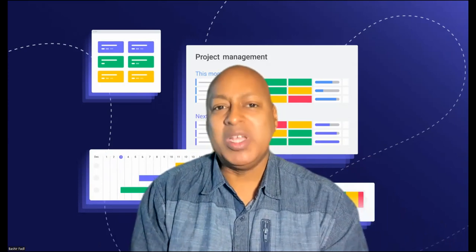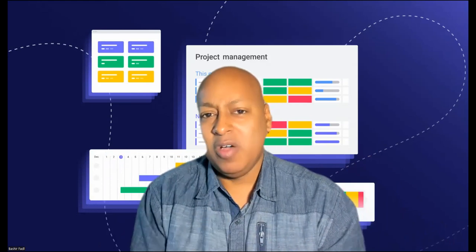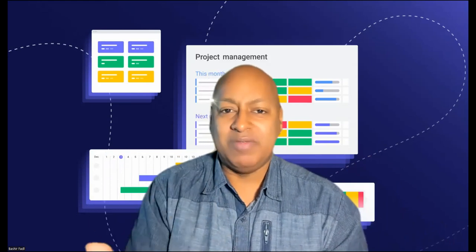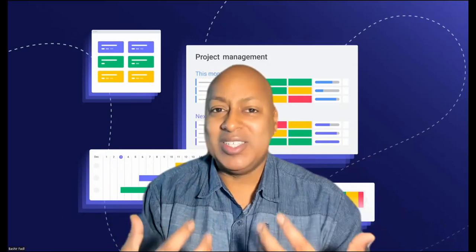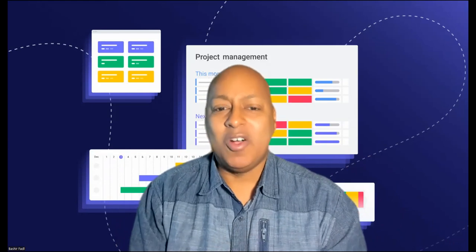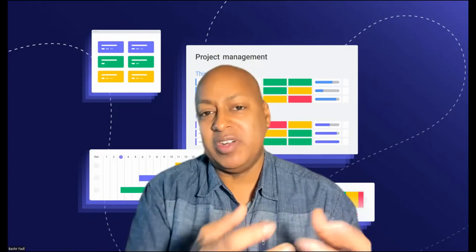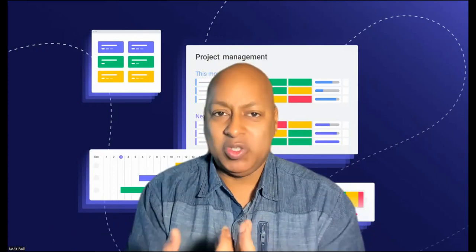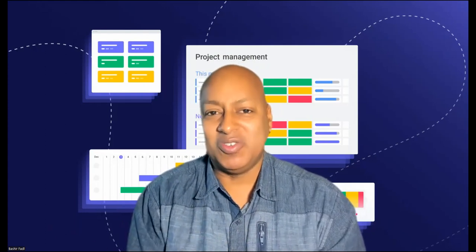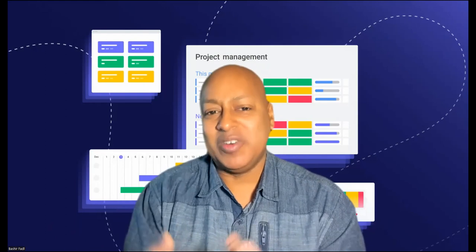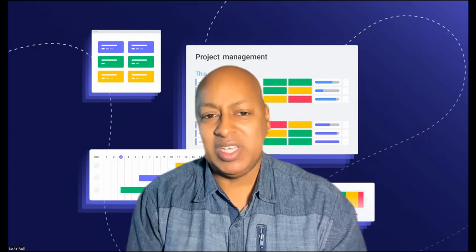Number three is resources. We're going to need resources to move things over, which means we're going to need human resources, just people. We might need a business analyst, 2 developers, and an administrator, so a team of 4, maybe less, maybe more. That's the human resources part of it. Also in resources, we have equipment. We might need a cloud server, a machine, whatever resources we need and access to them. And then material, especially if you're doing physical construction, you are going to need certain materials. In our case, it could be things such as documentation, BRD documentation, SOP documentation, and so on.